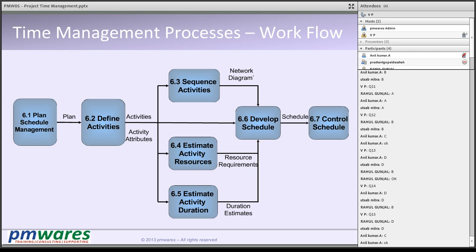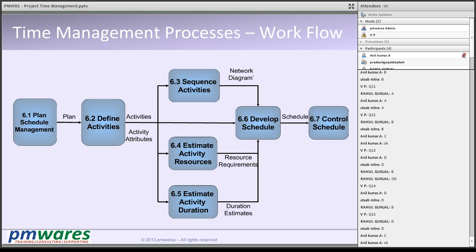The first activity in preparing the schedule is defining the activities. You already have a work breakdown structure with work packages. A work package is the smallest deliverable to be produced. Defining activities means for every work package, we need to identify the activities which are to be performed to produce that work package. So we take the WBS as input, look at each work package, and identify the activities required to produce that specific work package. The next step is to sequence those activities — once you identify them, you define the relationships among them: which happens first, which happens later, who is the predecessor and who is the successor.